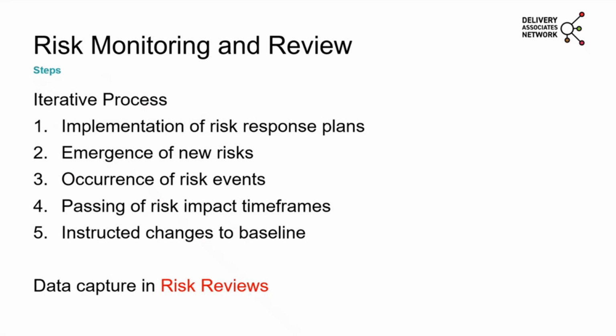For example, each risk can occur in a certain life cycle stage or when current activities take place. After the activity has taken place, this risk becomes irrelevant, so we can close it off in our risk register. It's not a risk to us anymore. And then reviewing, of course, the instructed changes to the baseline. So the data to be reported is captured in the risk reviews.